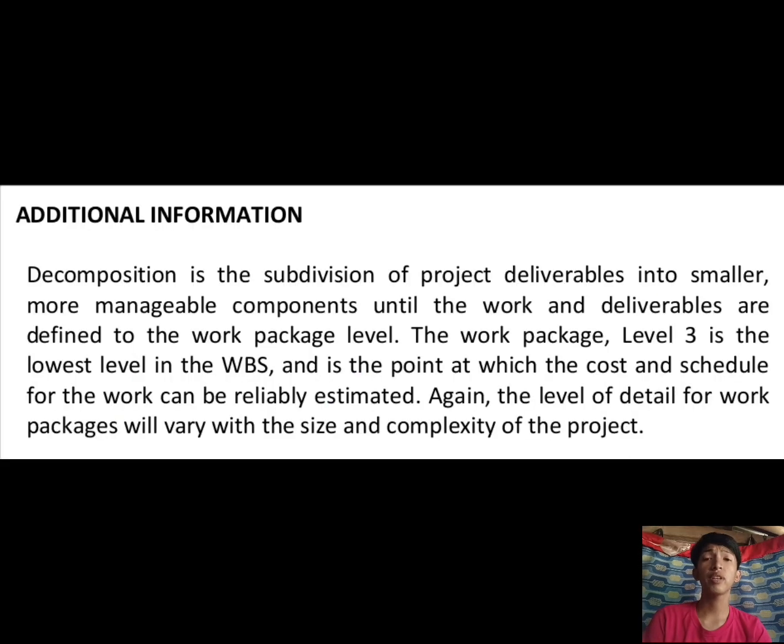So for additional information, decomposition is the subdivision of project deliverables into smaller, more manageable components until the work and deliverables are defined to work package level. So the work package level 3 is the lowest level in WBS and is the point at which the cost and schedules for the work can be reliably estimated. So again, the level of detail for work packages will vary with the size and complexity of the project.